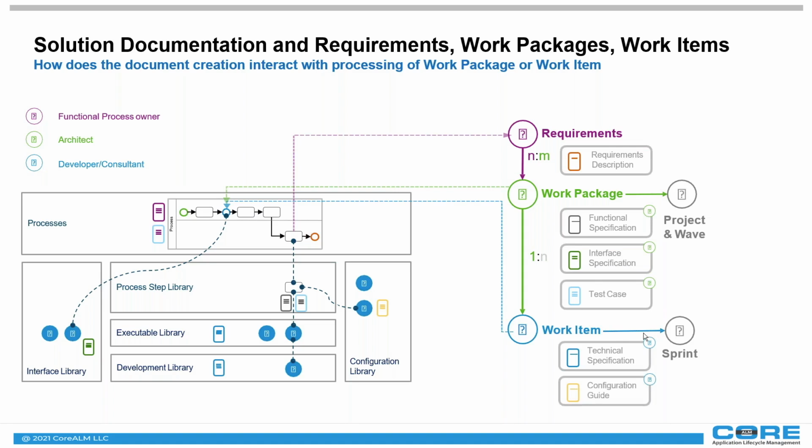Now, this work package is going to derive work items, and they are going to be assigned to a sprint. This wave here could have, for example, 2-3 sprints, and you're going to assign these work items depending on the dependency. We understand that in Focus Build, or when you build an SAP application, you are going to have dependencies from the beginning, which means we have to outline these work items in different sprints in order not to overlap or not to be behind.